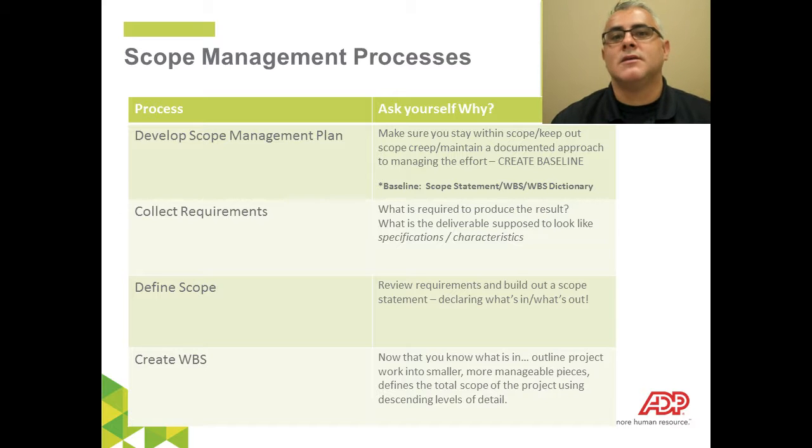The end result of the planning group for scope management is to create a scope statement, create a work breakdown structure, and create a work breakdown structure dictionary. So your scope management plan is going to outline your approach, and it's going to turn out exactly what is needed to create what is called the scope baseline. You'll notice on the slide, scope baseline is your scope statement, work breakdown structure, and work breakdown structure dictionary. Very important because those will be on your test.